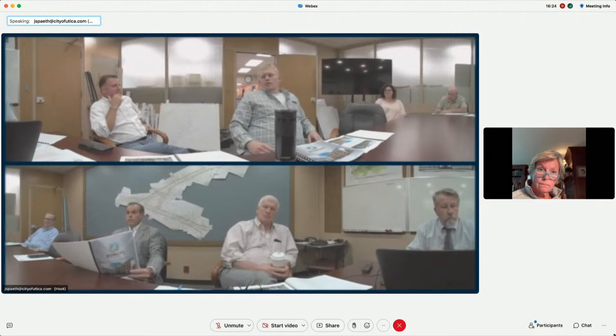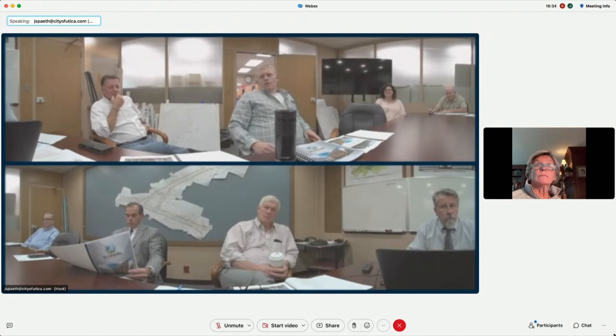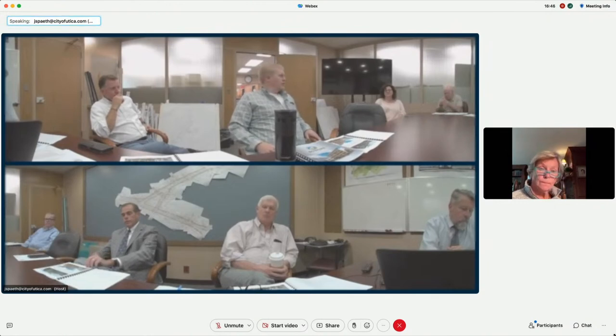So, you know, right now we're looking at obtaining the long lead type items, you know, the elevators, windows, doors, et cetera. So we're hoping to be substantially complete by March, but probably May. I mean, May we definitely want to be done. So, you know, we capture obviously a lot of students that are looking for a new apartment downtown for the next cycle.